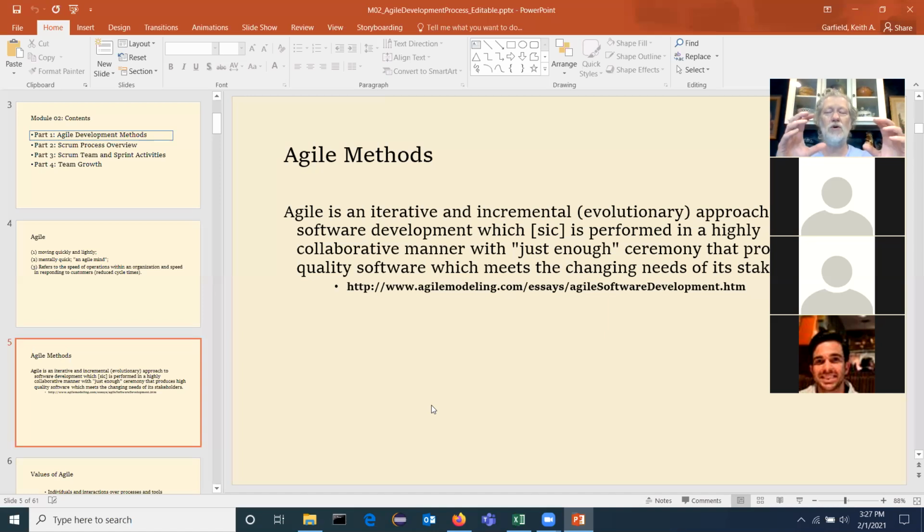come up with a design and we would have what's called a preliminary design review. And that was an all-day event, maybe a day and a half event, where 30 members from the customer would fly into our town and we'd all have a meeting of 40 or 50 people, giving them our preliminary design. And then about 3 or 4 months later, they'd come back and we'd have the critical design review, which means that's the final design. And then we would come back and we would actually start making the product and doing tests, and we had to document everything.